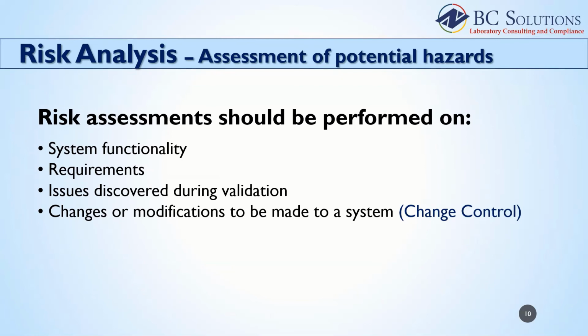Are there mitigation strategies that will reduce the risk? For example, establishing an SOP or training. How does this affect approval of your validation? What is the risk of taking the software live if high-risk issues cannot be resolved? Risk analysis must also be performed each time you make a change or modification to your software. This is a critical part of your change control process.